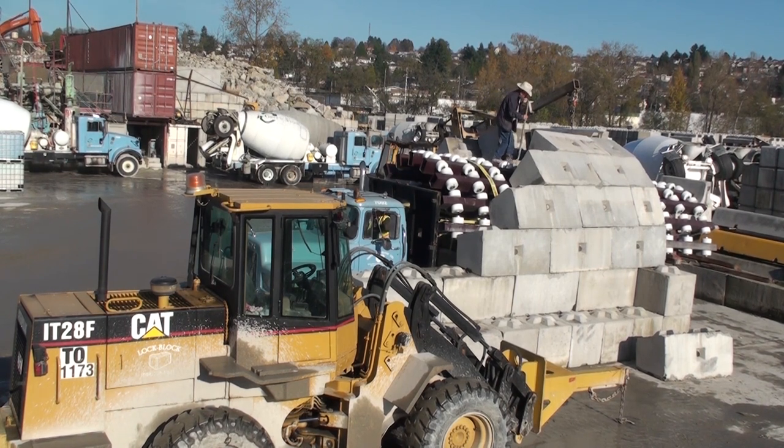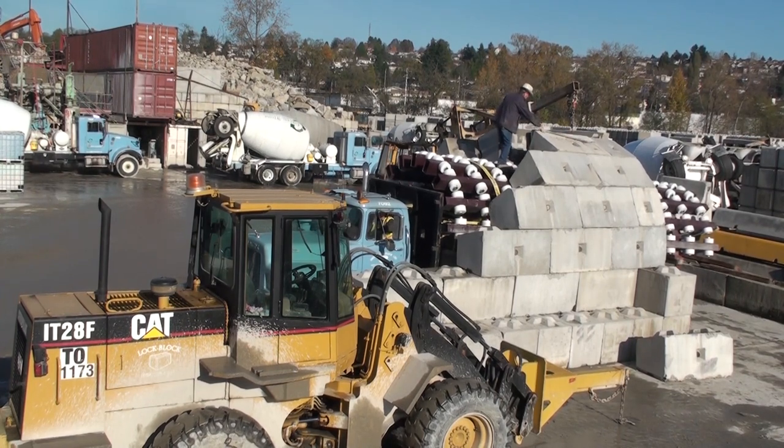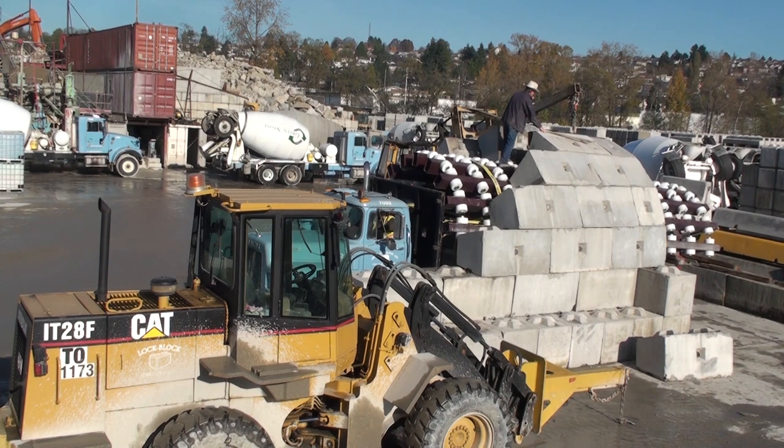So we assume that we're going to be able to move forward one 5-foot increment approximately every 5 minutes, which gives us roughly 1 foot per minute construction time. And the only real slowdown to how fast we can build this is how quickly we can get the blocks available. You see the truck is backing up there because we didn't have